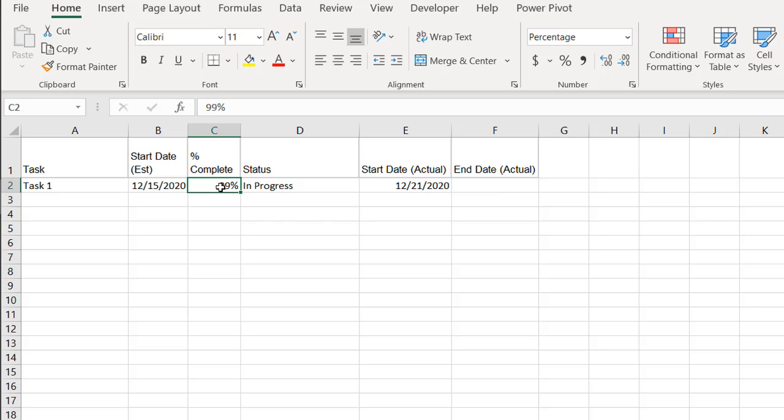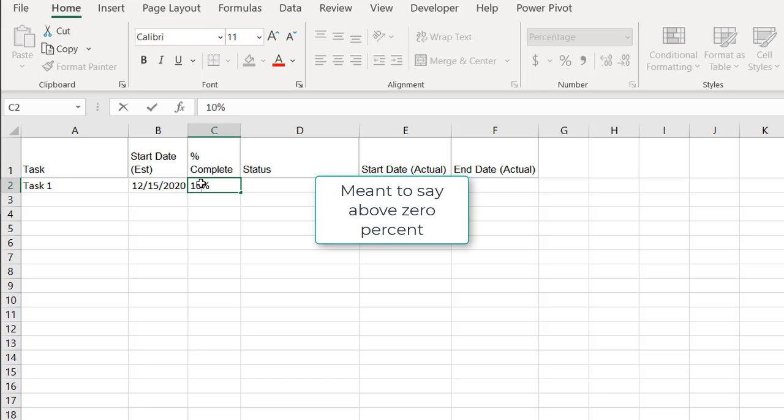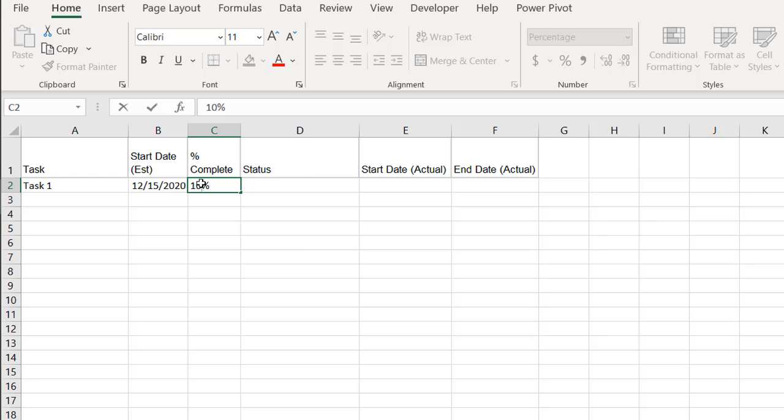If it's deleted, now this is one thing that is a caveat for this. If we press the delete button, the start date's going to delete there. So that's the one caveat. But the assumption is that if you're doing project management, for the most part you really don't go from anything above 10% to 0% when you started a task. That task is started, maybe it's ended at that point, but most of the time you really don't go back. You did start something, it just didn't really end.